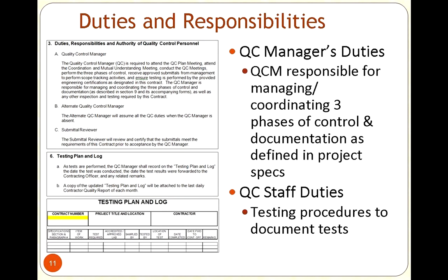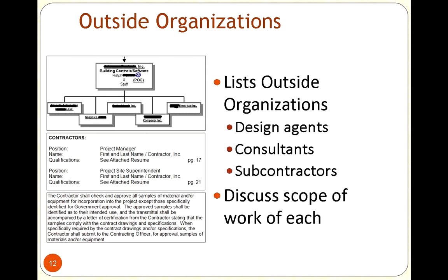So, again, going into the duties and responsibilities, one of the first things you have to do in addition to your internal folks is working with those external people like the contractors. And it's not just the contractor company. If they're subcontracting, you want to make sure you get that list of outside people, their qualifications that may be out there. Are they bringing in any consultants? Are they bringing in someone to do design work? Or I mentioned earlier a group that might subcontract out additional electricians that they don't have the staff for. You want to make sure they understand the scope of work as well.